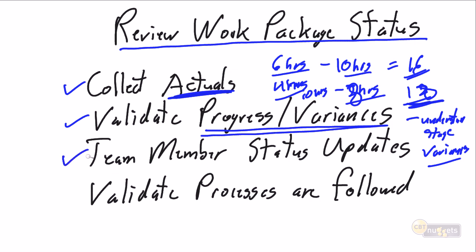The next key thing that we need to do is, getting the actuals is good, but we also need to do that physical communication with the team member and get their status update. What are you working on this week? What's going well? What's not going well? What are your plans for next week? What are your problems? What are your issues? What are your warnings? So to me, getting a work package status is collecting the facts.